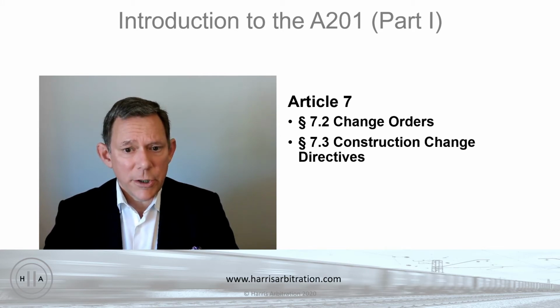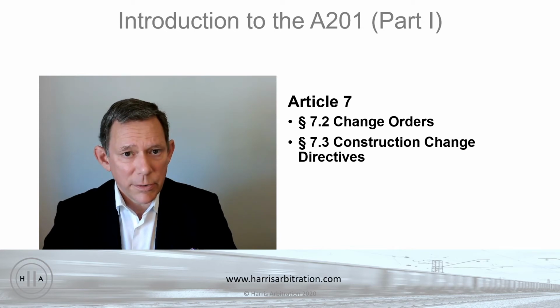So when you have a change, there may or may not, depending on what the change is, be an impact on schedule, and there may or may not be an impact on cost. But either way, all of that needs to get reflected in a change order, which is simply a modification to the original contract that's agreed to by both parties.